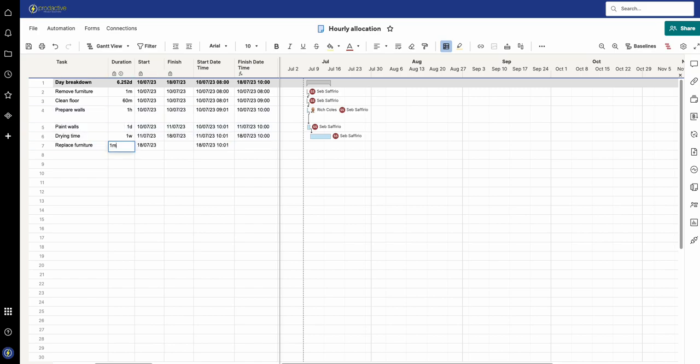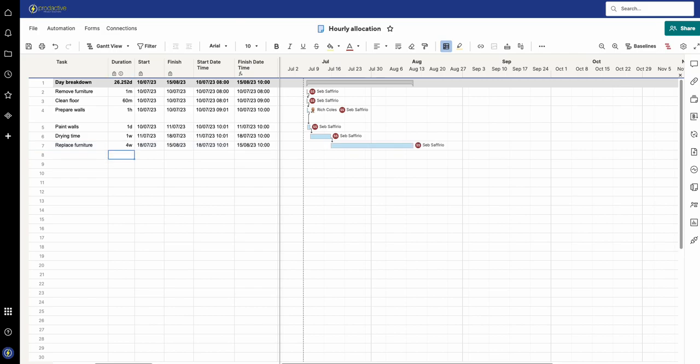Now if I put in 1 month you'll see that it doesn't recognize month in Smartsheet. So all we need to do if you want a month is just change it to 4 weeks. If you work on a weekly basis that works well.